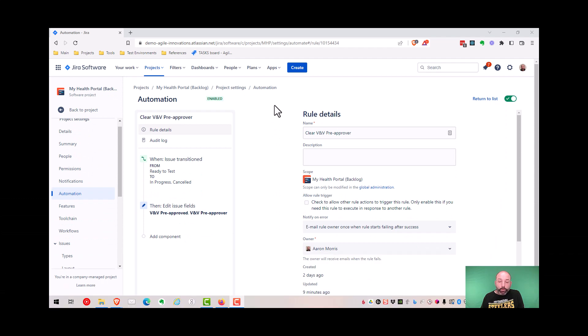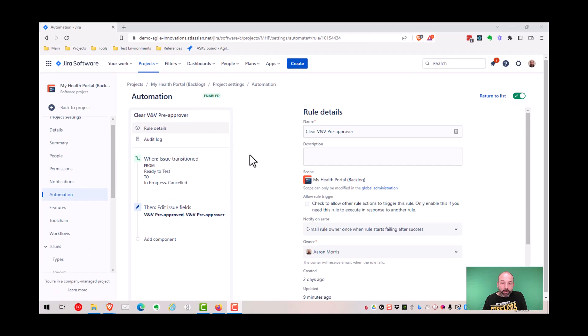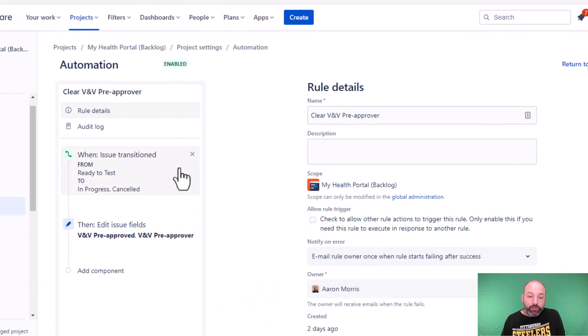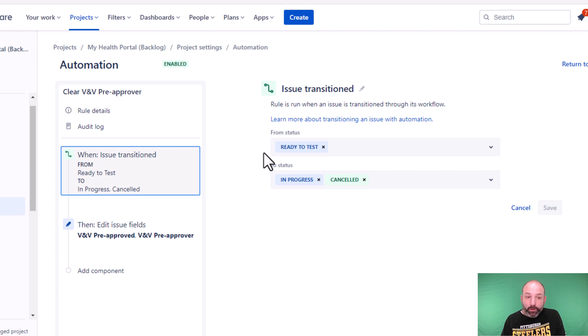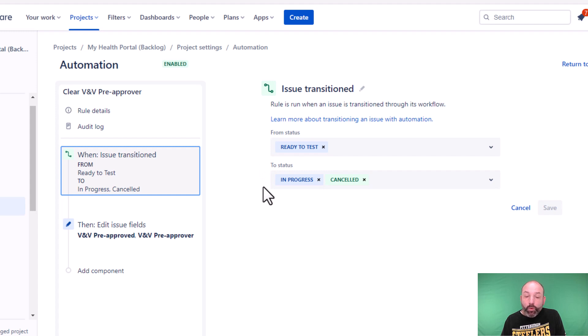Now let's look at the rule for clearing the pre-approval information. This rule has two pieces also, it has the trigger and the action. The trigger in this case is any transition backward from ready to test. So if we have an issue that has been pre-approved and we move it back to in progress or to canceled, we want to clear out that electronic approval information.